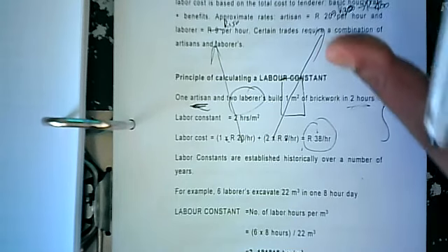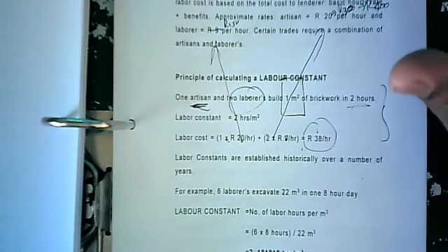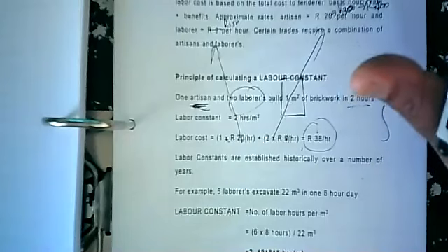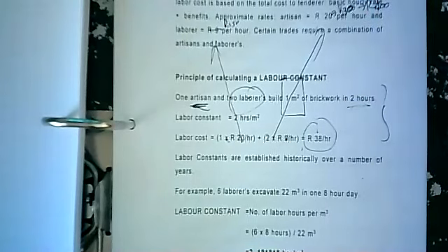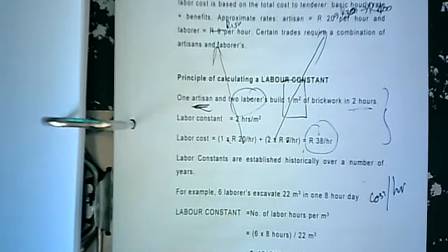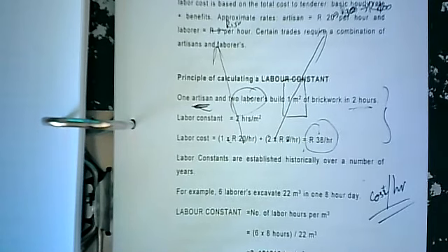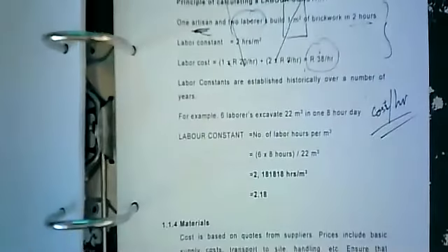That brings me to another important point for estimation. Every calculation we do is going to be reduced to cost per hour. Cost per hour. All right. So try not to lose sight of that as we progress.